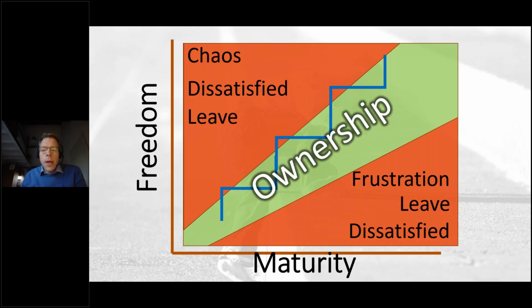With a road assistance company here in the Netherlands, and also with a big bank in the Netherlands, we have three or four levels of maturity. In the first level of maturity, it's all about being reliable during sprint planning, so achieving the sprint backlog and achieving the sprint goal. So you could say that we look at three metrics. One metric is the reliability of the sprint planning, and it should be higher than 80 or 90%. So 80 or 90% of the estimated items are done by the end of the sprint. And if not, the team informs the product owner and the stakeholders quickly, and necessary changes are made.